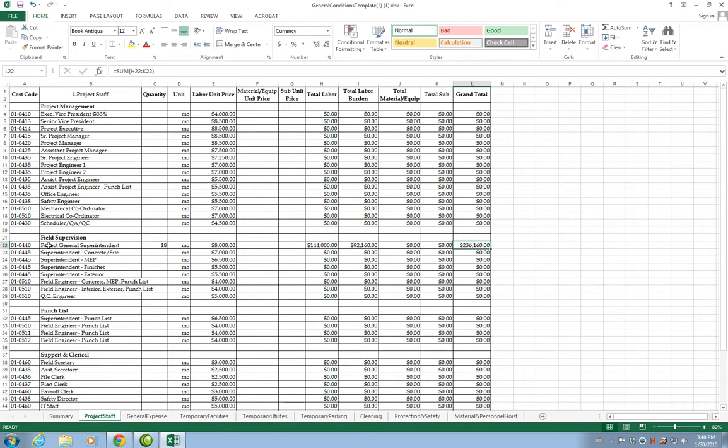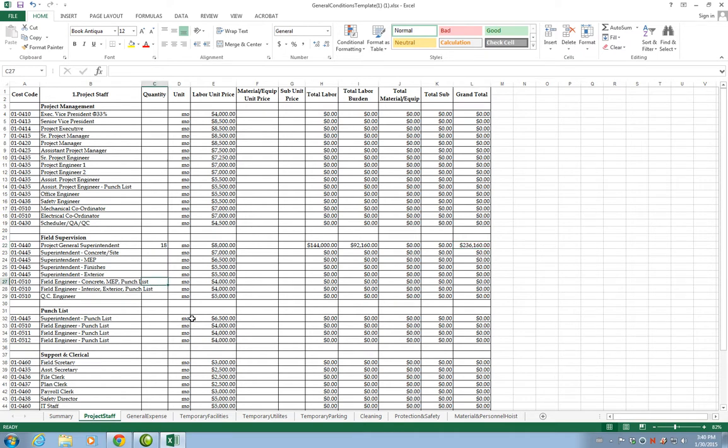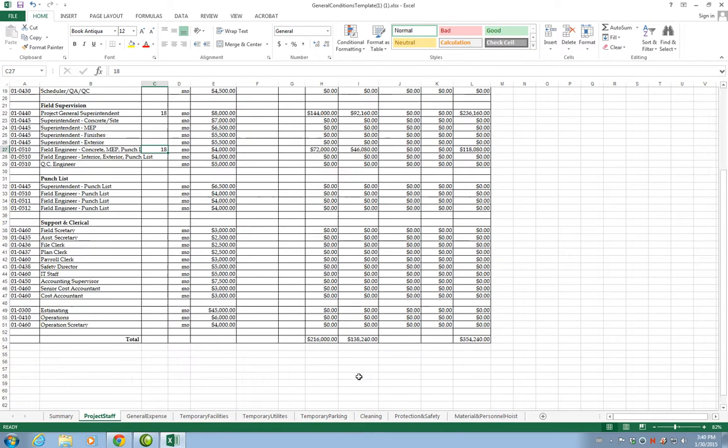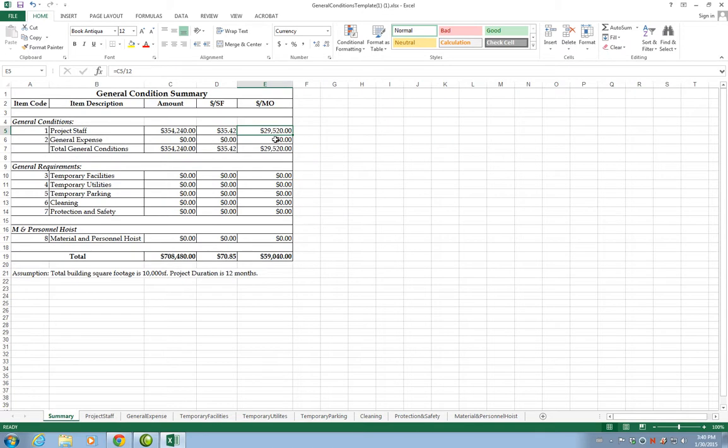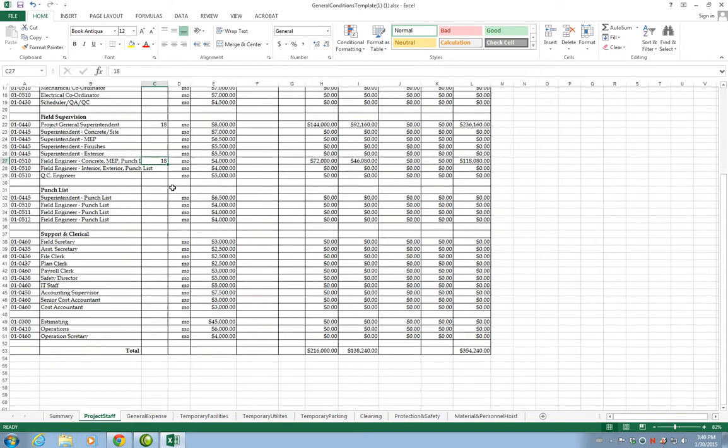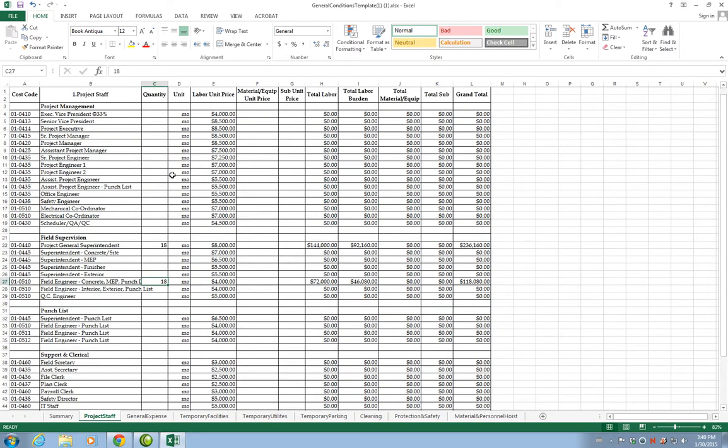We entered the project superintendent and let's say that we have also a project engineer. We may have a field engineer here for concrete, MEP, punch list, interiors, and so on. Let's say this person stays on the job again 18 months. Now we have a new total, a new running total, and then the cost per square foot and cost per month has changed. You enter in this column how many months each person is going to work.